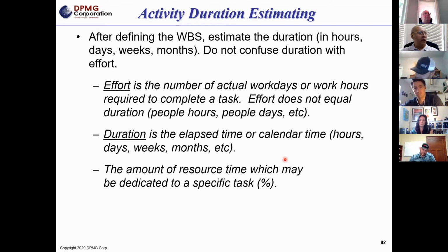Often, and I've been asking Kevin about this in regards to the project parking lot, in some cases warranty periods are considered the completion of a project. Sometimes the end of delivery or the end of installation is considered completion, and there's still a warranty period after. So you have to be crystal clear as to what is the end of the project. We walk into most companies, and everyone is at least a 98% completer, because there's always the 2% that never gets completed. It's still out there.